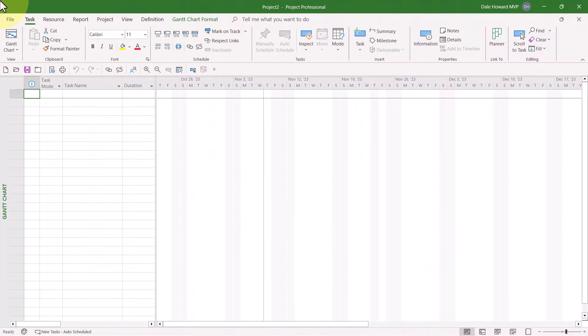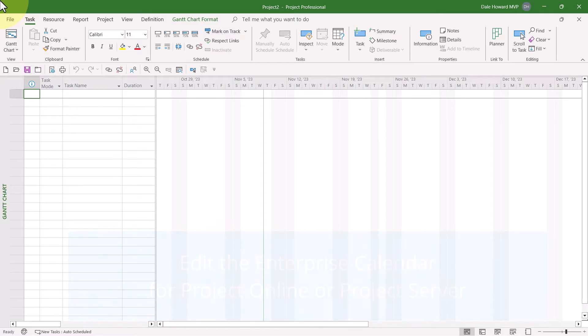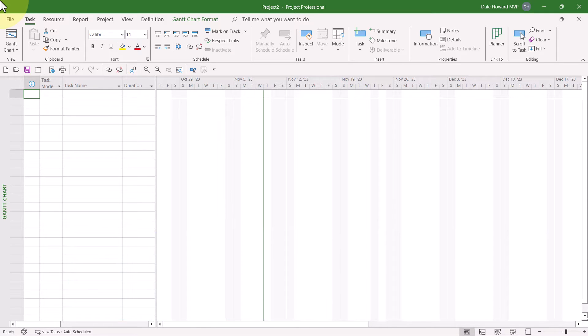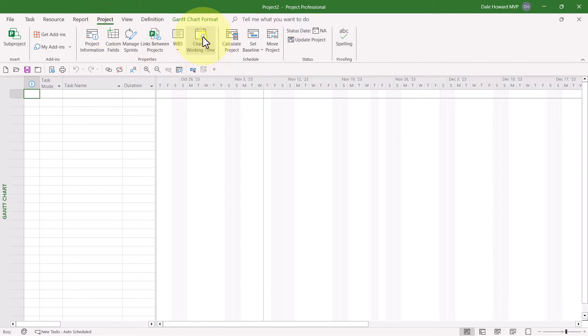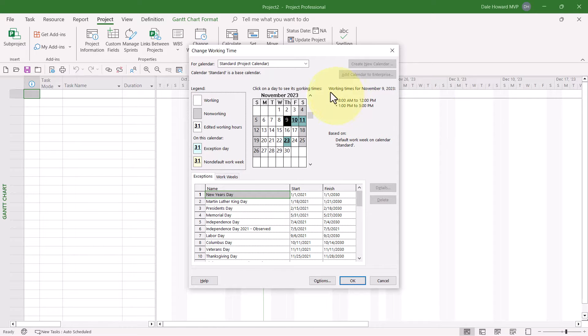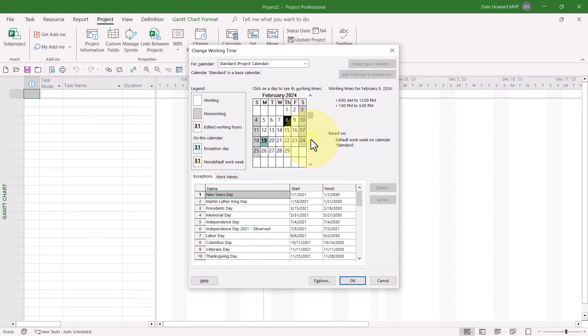If you want to edit the Enterprise Standard Calendar or create new Enterprise Calendars in Project Online or Project Server, you cannot do that by starting first in Microsoft Project. Let me show you how this works. If I click the Project tab to display the Project Ribbon and then click Change Working Time, Microsoft Project displays the Change Working Time dialog with the Enterprise Standard Calendar selected at the top, but notice that everything in the dialog is grayed out. All the buttons are disabled.